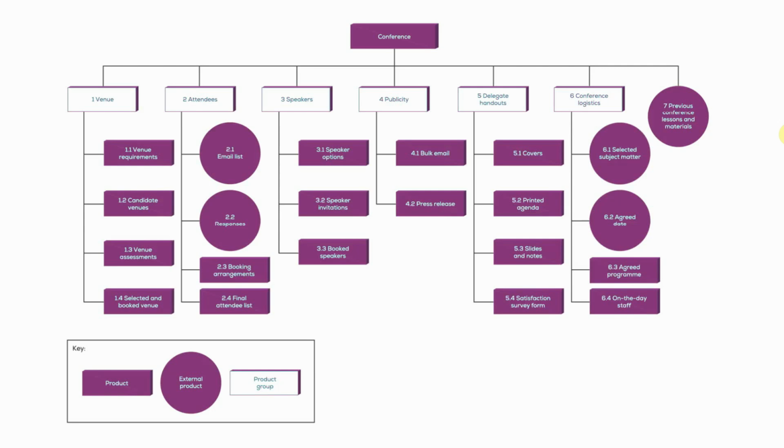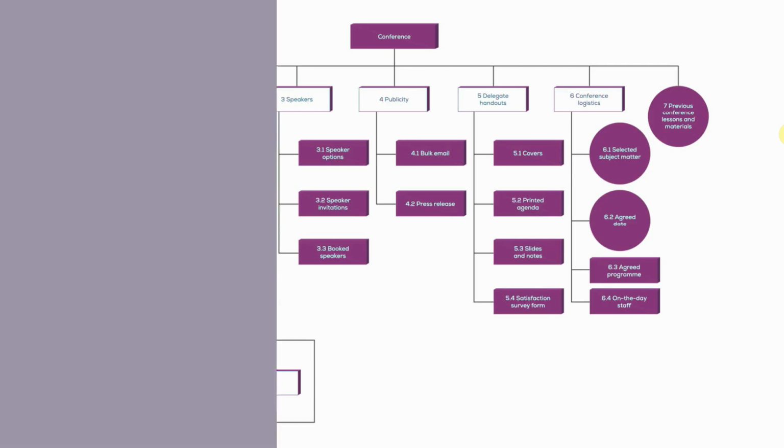You may or may not, in your own experience, have come across a work breakdown structure. And this is not dissimilar to a work breakdown structure, except that, in a work breakdown structure, it says paint the walls. And in a product breakdown structure, it says create a painted wall. So we're looking at that. Remember, PRINCE2's focus on products principle relates. So that is a product breakdown structure. That's step 2 of product-based planning done.